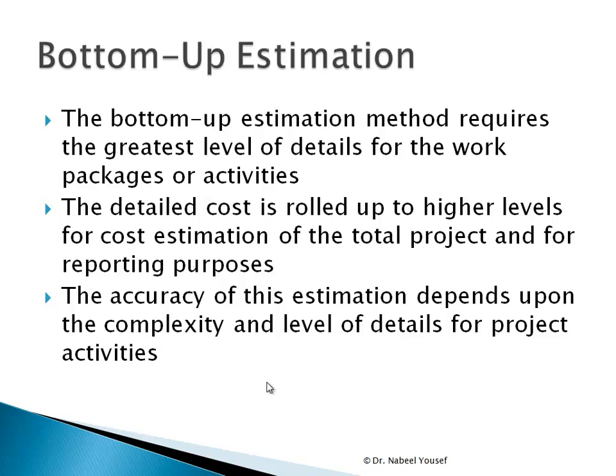For the bottom-up estimation, it's a method that requires the greatest level of detail for the work breakdown packages or activities in the work breakdown structure. That means I have to break the activities into sub-activities and sub-activities and so on, until I reach a work package, which is a small one that will identify the different resources, equipment, and material needed to accomplish such a small activity or work package.